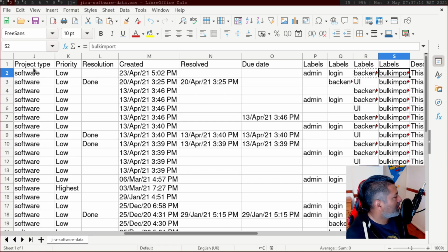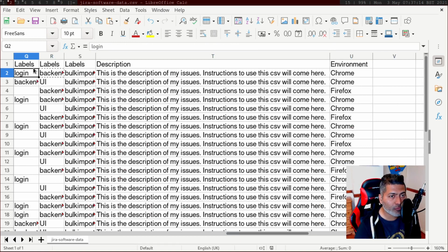But I have a small tip for you. If you're importing data using CSV, and I'm sharing this based on my experience, if you have to delete those issues, you have to first identify those newly imported issues. So what I normally do, I prefer using labels, so that if I've made a mistake in the CSV import, let us say I missed one column, because usually if you don't use the correct date formats, the issues will import, but the date will be today's date. In those cases you need to revert, and the revert in this case is nothing but deleting those issues. But to delete those issues, you need to first identify them. So I use a label, and I keep this label unique so that every time I import, I have a way to delete those issues quickly based on this label. So if I perform this import again, I'll probably use something like bulk import. Maybe I'll add today's date without, of course, any spaces.